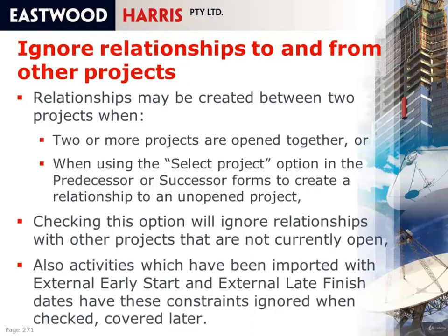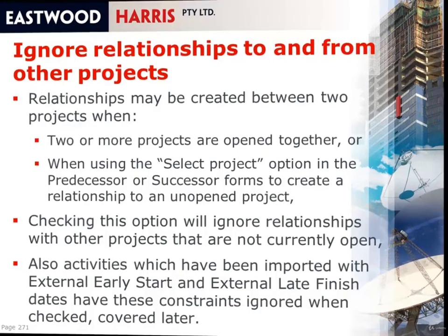Also, activities which have been imported with external early start and external late finish dates will have these constraints ignored when this option is checked, and we'll talk about the external early start and external late finish when we discuss importing and exporting an XCR file.